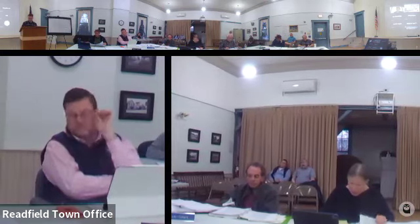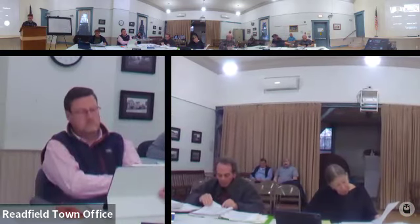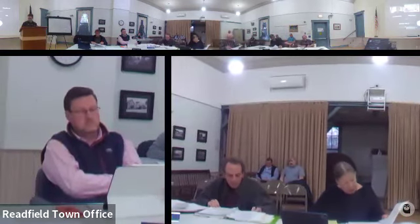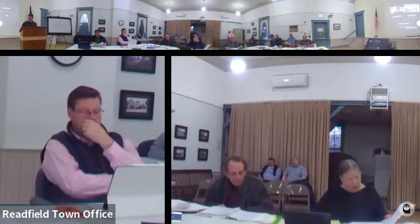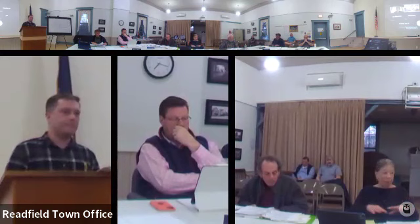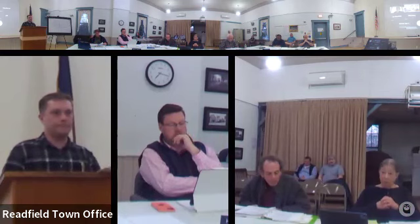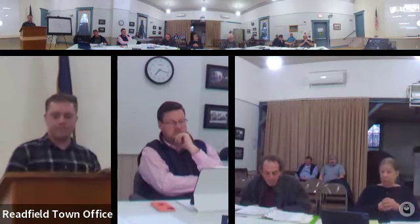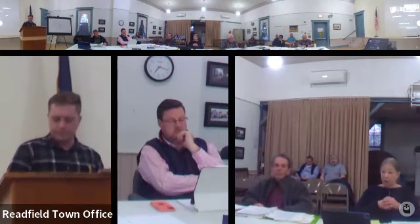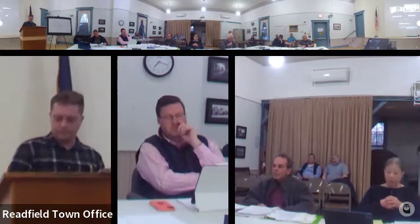Also in that same section, J for number 23 requires a construction schedule, including anticipated beginning and completion dates. We certainly understand that construction is dependent on when you get your approval and so forth. But I think we need some sort of a projected construction schedule as part of the application. That certainly could take into account that it's somewhat dependent on when and if it's approved, but I think there needs to be something in that regard.